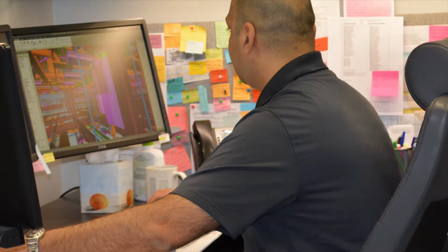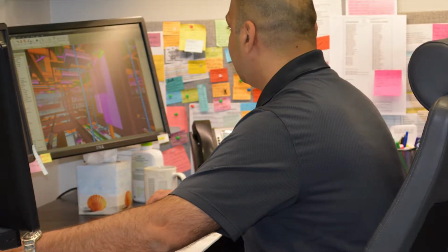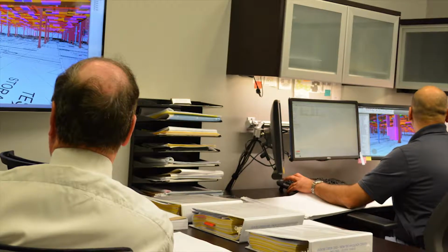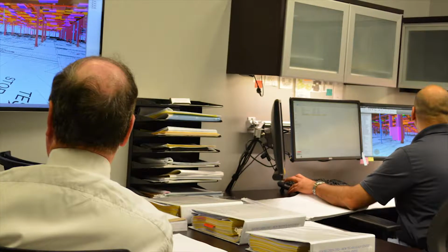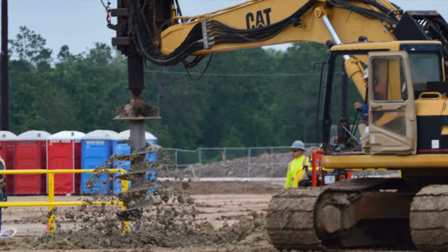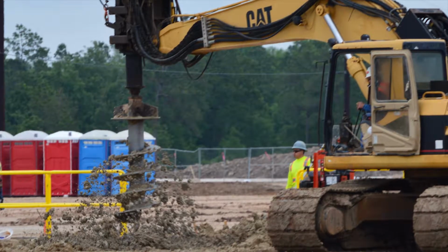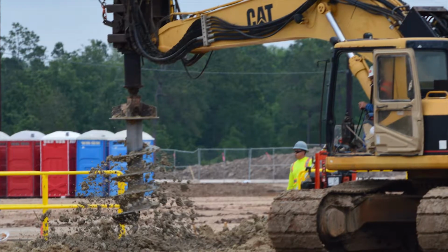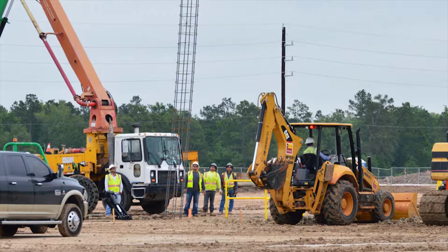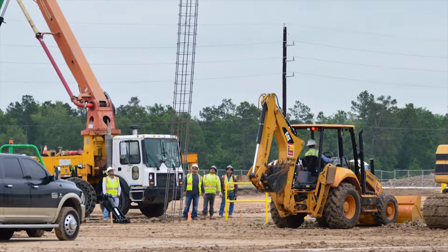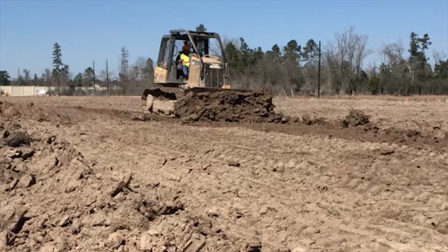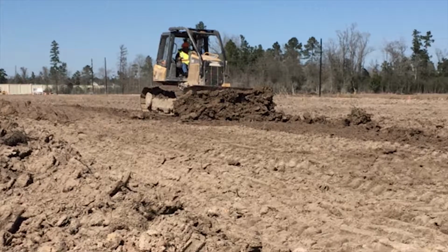The virtual model of the building is assembled by the Durotech Virtual Design Coordinator from drawings by different members of the design and subcontracting teams. It is used before and during construction to identify problems before building components are built and found to be wrong. Conflicts between the design of different materials, incorrect sizes and dimensions which cannot change must all be identified, corrected, and made to work. Many times the schedule is so tight, this is done just days before the materials are put